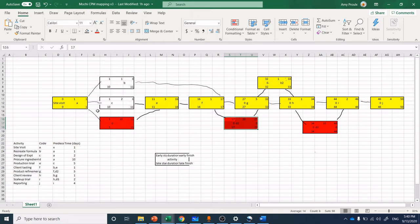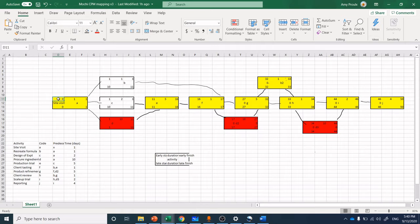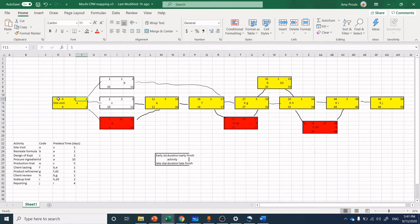Because what I wanted to show you was, 3x3 just happens to be nice and tidy for mapping out the different elements that are used in the critical path mapping. So the first time around, you are going to fill out the early start, the duration, and the early finish. So you're doing a forward pass on this activity. So the site visit, we're going to go with the optimistic timeframes here. So site visit, it starts at time zero. We say it's going to run for a duration of one day. And so it ends on day one.